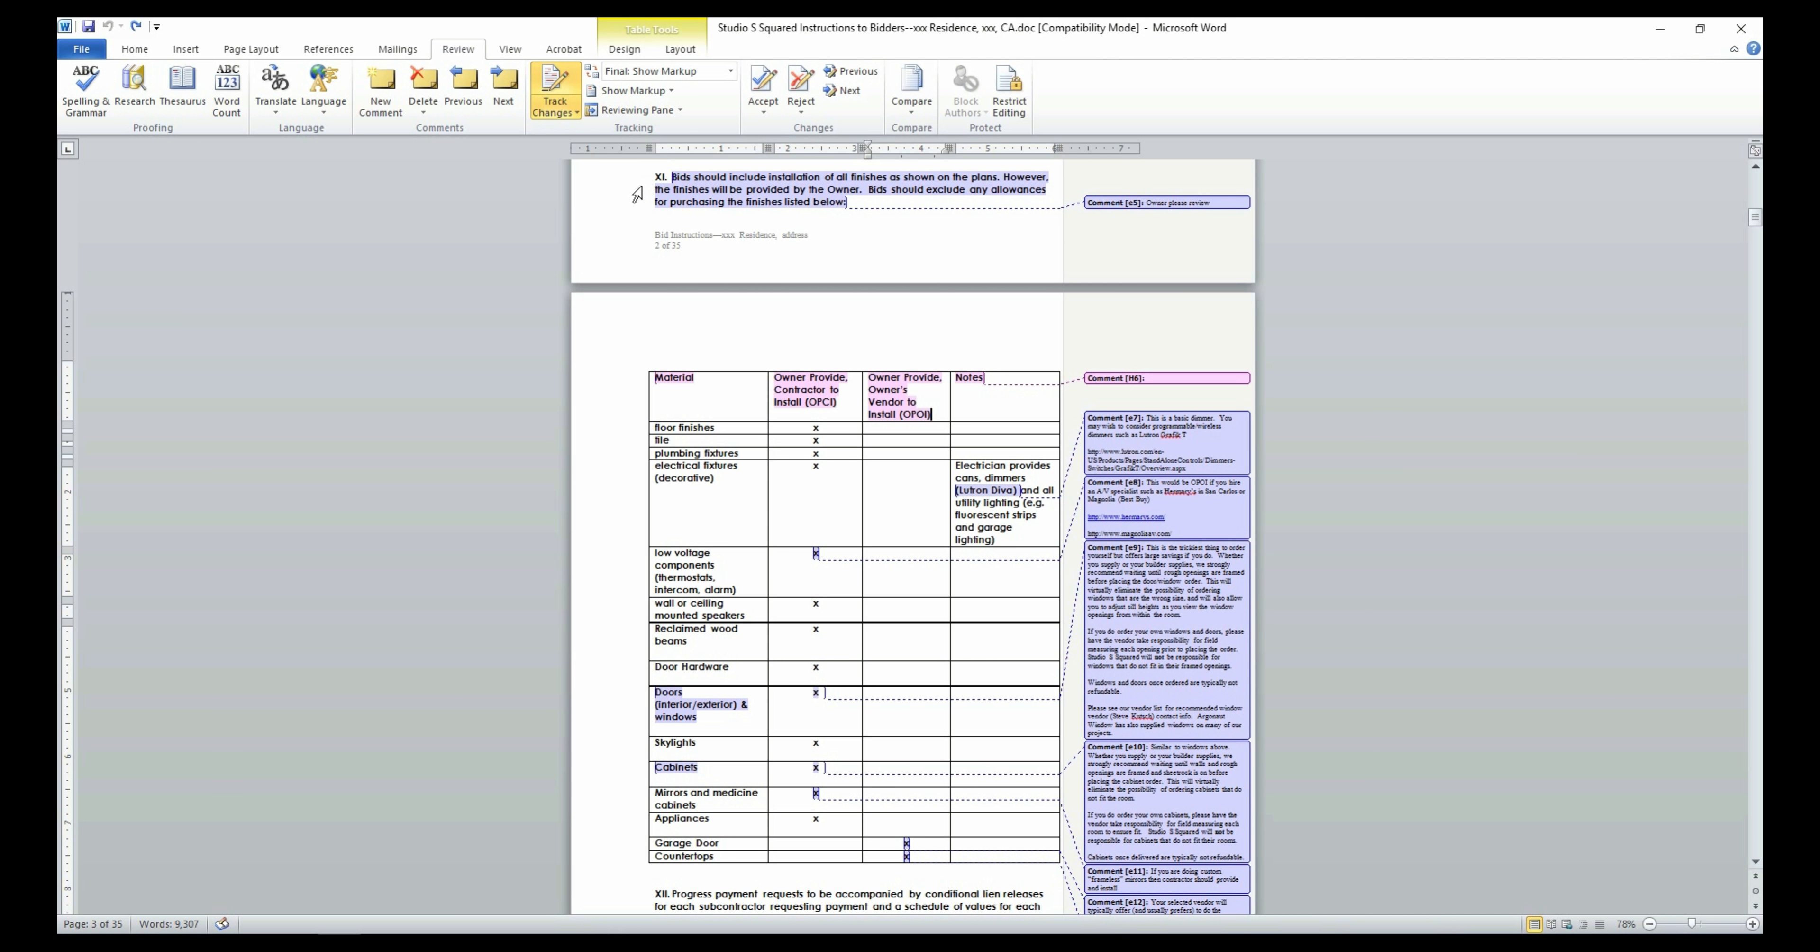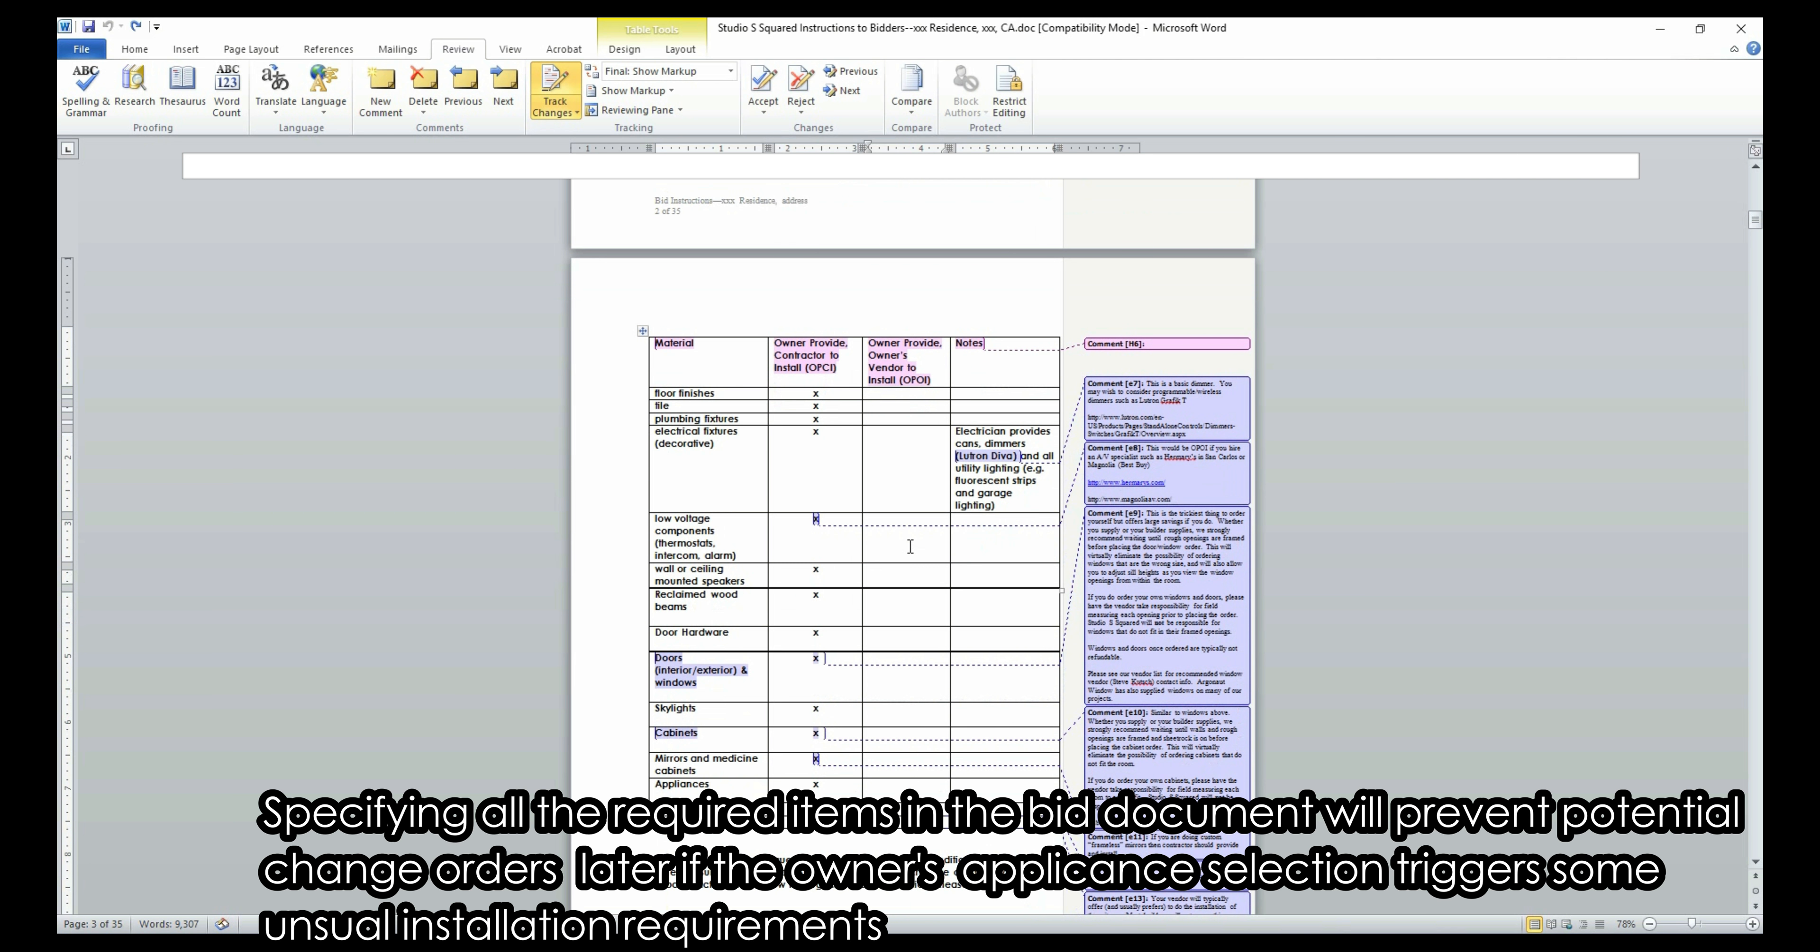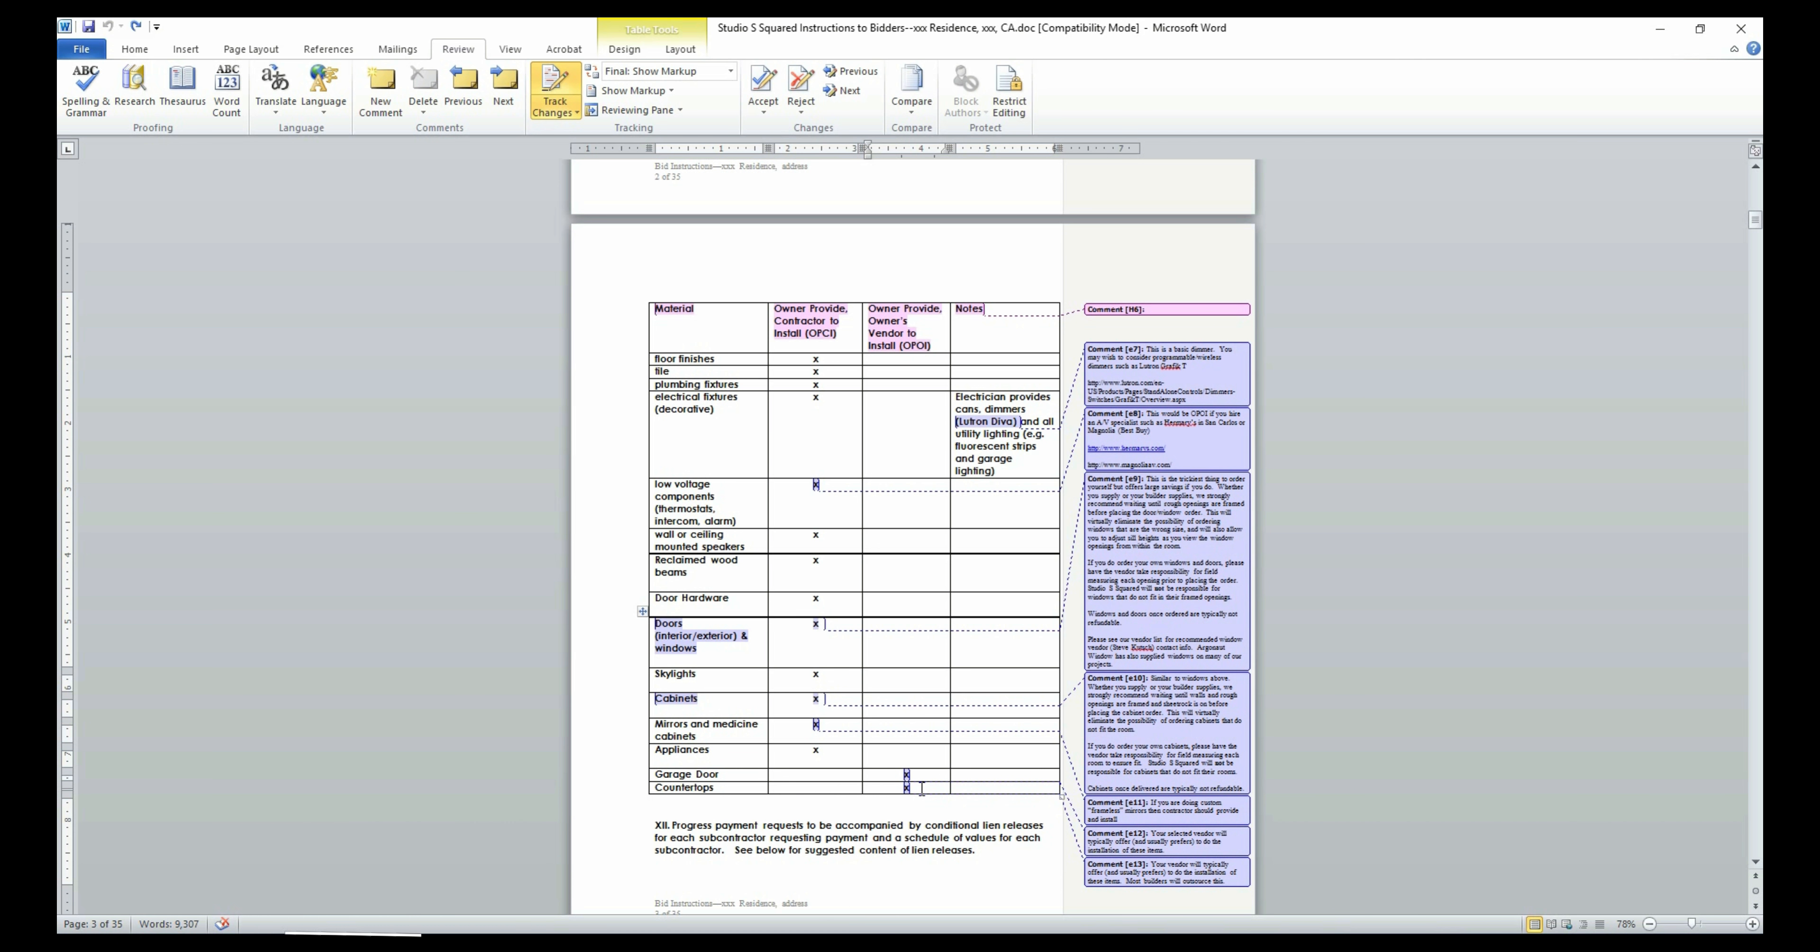Section 11 is one of the most important portions of this ITB. It has three options: owner provide and contractor to install, owner provide and owner's vendor to install, and contractor provide and contractor to install. The general practice is for the owner to purchase all the material and have your contractor install all the materials on site except the countertops and garage doors.